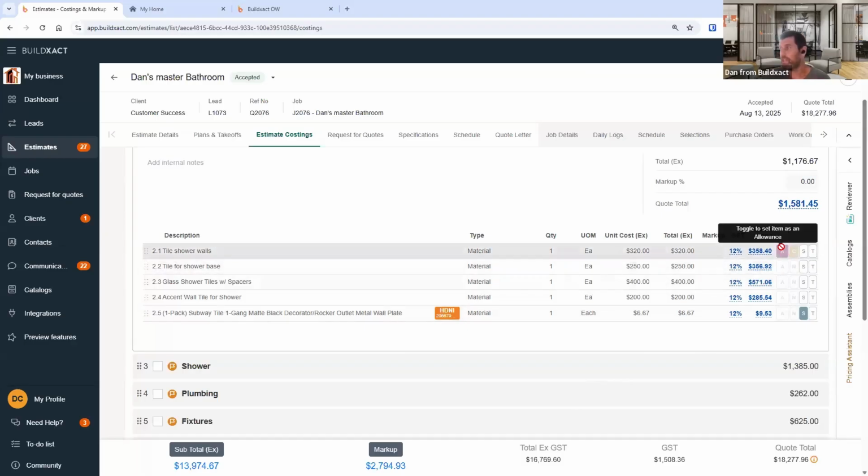Awesome. So from here, the allowances, that's what I was getting to. Anything that was initially selected as an allowance back in the estimate is going to automatically feed into selections. The logic is that an allowance could be for particular flooring, or an oven, because we're just giving you a rough quote, client, and by the time we get into the job, we'll pick an oven, whatever you want. We pick it up initially as anything marked as that placeholder type item, allowance.